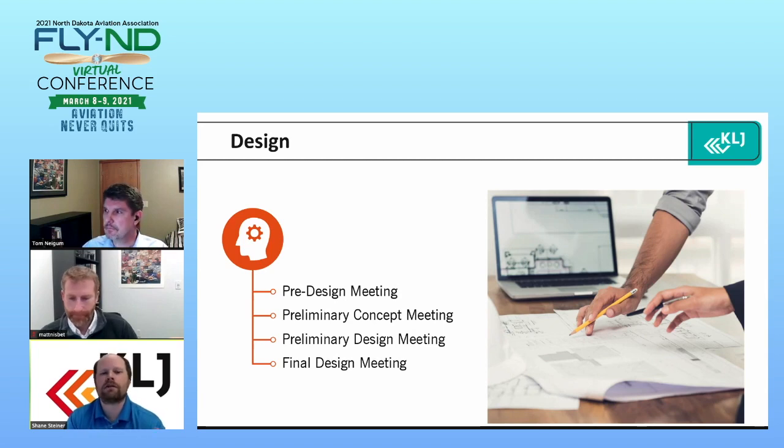So from there we go into the preliminary concept meeting, and that's really where we take that data that we mine from our internal pre-design meeting, and we meet with really all the stakeholders involved with the project. So we're meeting not only with the sponsor, but with the agency. So the FAA, the state agencies, any local agencies that will be affected, whether that's the control tower, any major utility companies that are going to be affected, any other local stakeholders that have an impact from the project.